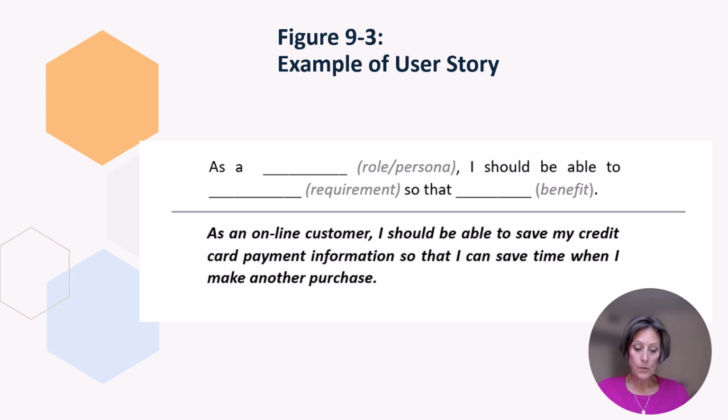Other elements that product owners use to rank order the product backlog include uncertainty and dependencies. If there is more risk in designing and developing a key feature, the product owner should move that component higher in the prioritized product backlog. While dealing with risk early in a project does not guarantee success, having more time to solve a tricky problem usually helps the team's ability to deal with uncertainty.